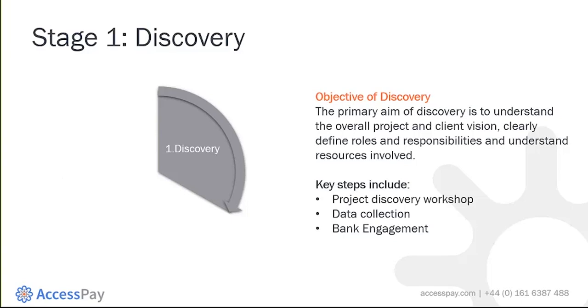We want this project to run as smoothly as possible, so this is a very important phase for us. And once we've completed the discovery, we will then provide you with a key milestone plan to help you track progress and also to help maintain accountability. Key steps in the discovery stage are a discovery workshop, data collection and bank engagement.